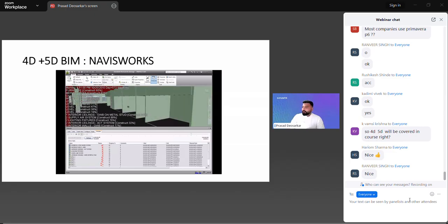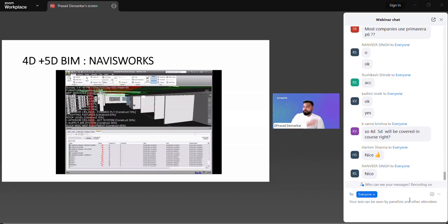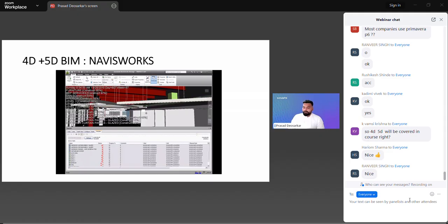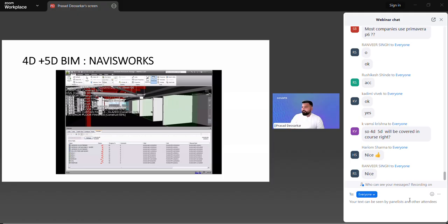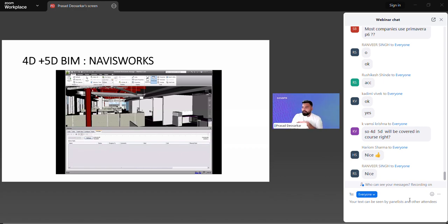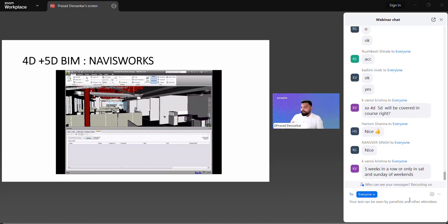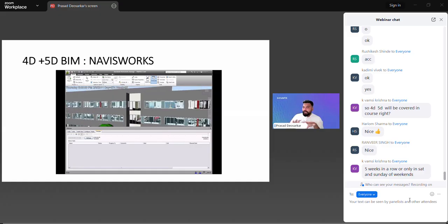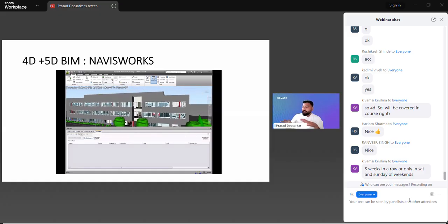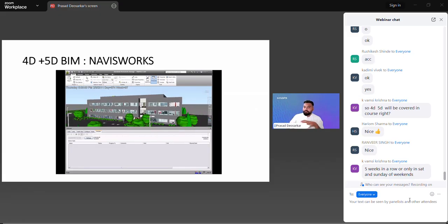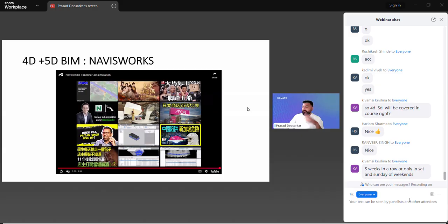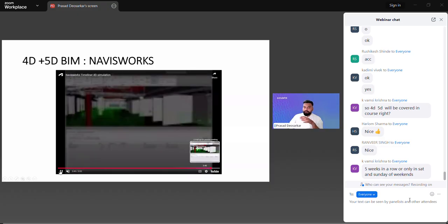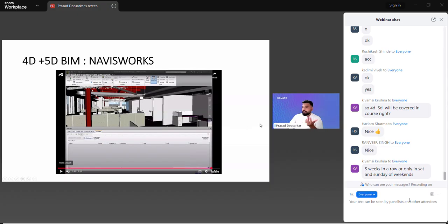So if I were to just pause the video at 1 second, I would be able to see, okay, today's date is, let's say, 25th of August. So on 25th of August at 9 o'clock, what is the progress on site? What was it supposed to be? And what is it right now? Okay. So when we talk about planned versus actual, I'm going to visualize where all my delay positions are, where my construction project is being delayed, which particular area of the project needs my intervention or the project management's intervention, right?